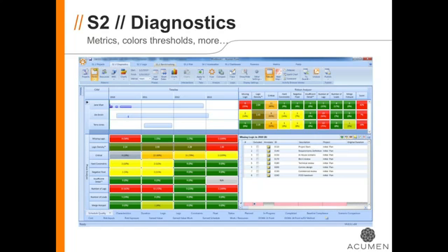The power of this screen is to not only see whether you're scoring in red, yellow, or green for your metrics, but also to see which specific activities are responsible for areas that you are red or yellow. For example, on this screen, I can not only see that missing logic is in a red condition, but I can see in the lower right-hand corner the listing of activities that's creating the issue.